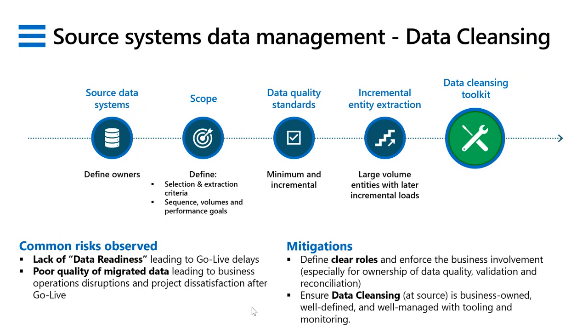And sometimes this is difficult because of statements of work, etc., where the project says the data cleansing is a responsibility of the business. We as a project team are going to focus on delivery of the functional requirements. The partner's SOW is saying that we're responsible for delivering the designs and coding, and the data cleansing and the ownership of the data falls between the cracks.